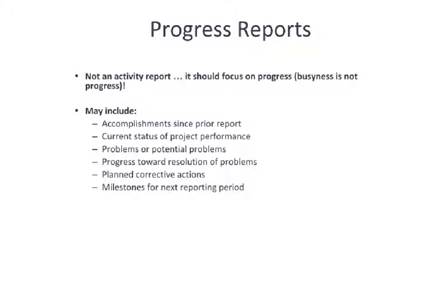You would likely want to summarize the current status of project performance. What percent are you at? Have we reached 75% completion? Are we 75% to the quality that we need and we're still working on fixing the issues? What's going on? So what is the actual project performance? This could include financial as well, depending upon how frequently financial tracking is going to be included in this cycle.